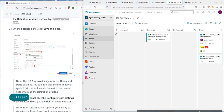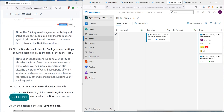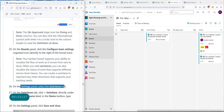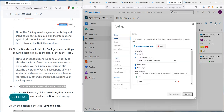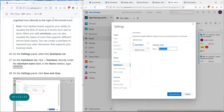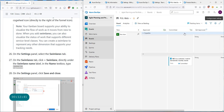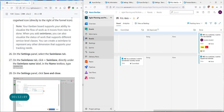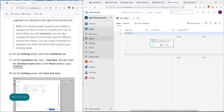On the boards panel, click configure team settings again. On the settings panel, select the Swimlanes option — this is an interesting feature. Add a swimlane and name it 'Expedite'. Save and close. The Expedited swimlane now shows up, and you can move any items into that lane if you want to expedite them and give them priority.